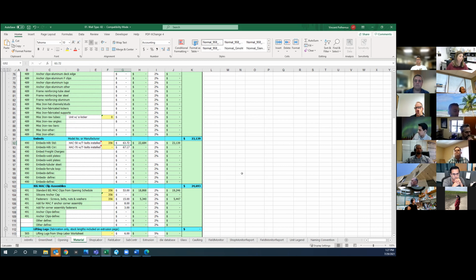These are the spots where you're going to gather that data, where you can see, okay, Nicole has figured 356 embeds and there's the price. If we know that, and now when you place the order, if we're over budget, or even before that, when you're filling out that form at the start of a job, now you have that target. You know exactly what was figured.